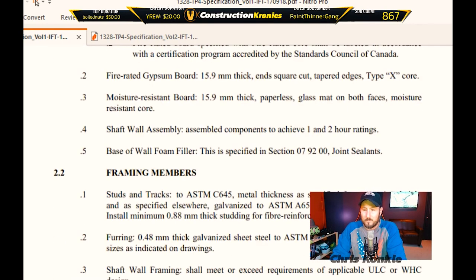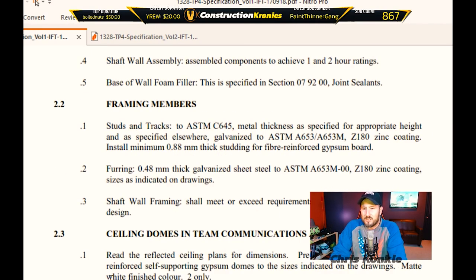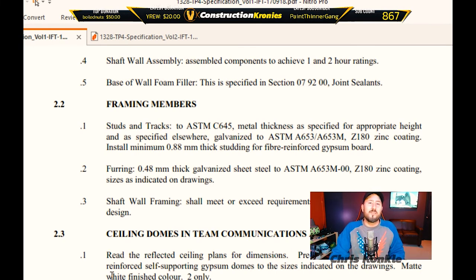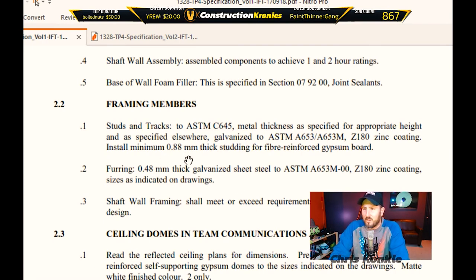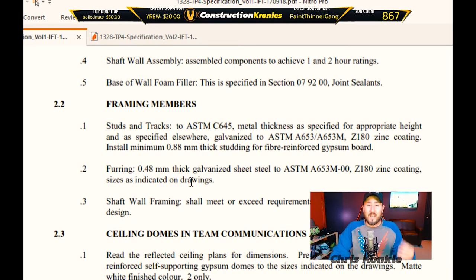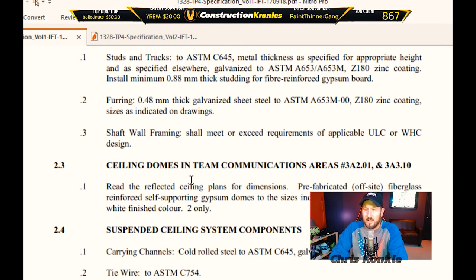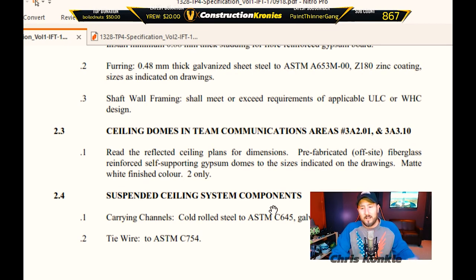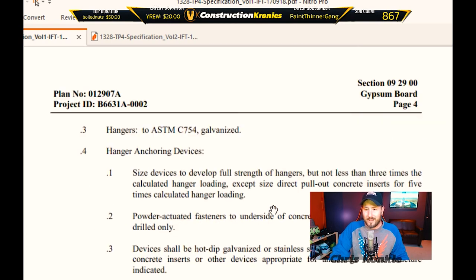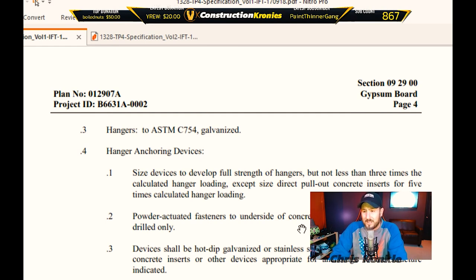Framing members will tell you what types of track, shaft wall framing, and so on. As a drywaller you want to look at the framing to make sure it's up to specification before closing things up. It will tell you where double studs are required — doors, windows, ends of walls — so you need to plan ahead and order the right amount of studs. For suspended ceiling system components like T-bar, it'll tell you what types of tie wire and all the hardware you need. Notably: power-actuated fasteners to the underside of a concrete structure are not permitted — drilled only — and drilling takes more time.